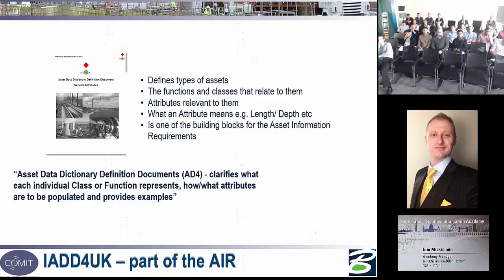I need people to think about this. And this is the second challenge I have. Yes, a lot of your works are temporary and they don't go down to being permanent. But we do need to know what information you require at the briefing phase. Do you want the client to be given it at the detailed design phase, at the construction, at the handover, if something's become permanent work, and onwards? So a data dictionary that gives a common metadata standard across the board for temporary works is my second challenge to you.